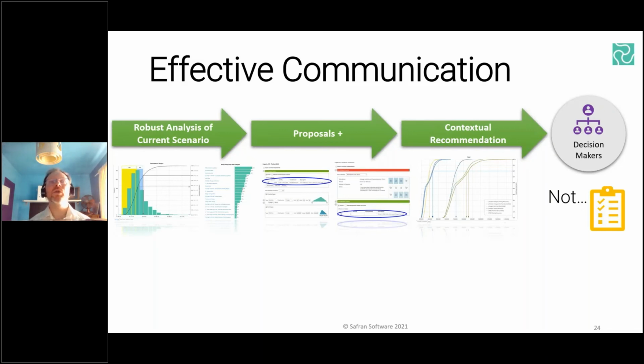So by using the joint confidence levels and spotting patterns of correlation, you can use this to support contextual recommendations regarding multiple possible courses of action or inaction to various what-if opportunities and mitigation proposals by sensing their likely cost and schedule impact against specific objectives, such as the hiring of the airfield example that we went through earlier, as well as using probabilistic cash flow to adjust expectations or baselines on where funding levels are going to be required at any given time.